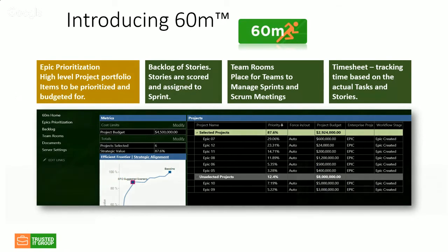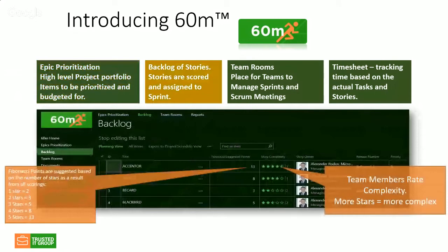As far as the backlog and stories, that's another module that we are particularly proud of, and that's the heart of Agile. That's my opinion from the data integrity perspective. So we collect all the stories in one backlog, basically a big bucket of stories, and this is where we start building the story attributes. This is the story name, this is the description, this is the attachment to that story, this is the story owner, this is the release number. There's a priority. You have all kinds of different attributes, and it's easy to add or remove some of these attributes when it comes to the framework configuration.